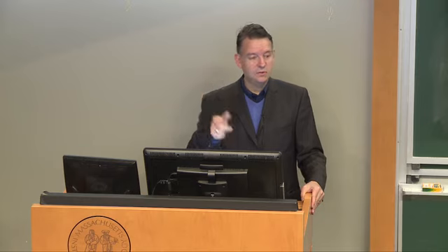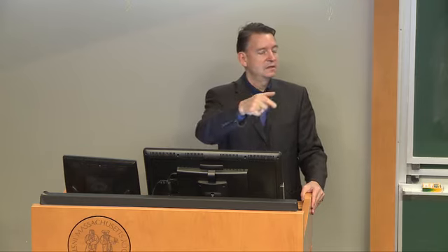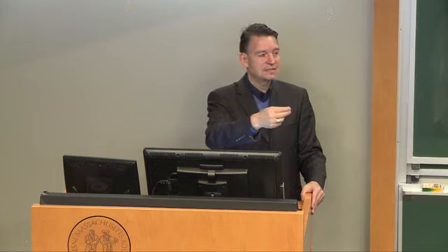But for example, we just talked about testing. If you have a very limited budget, what is the first thing people typically cut out? What's the first thing to go? Testing. Testing is very important. Sam asked me during the break, what's your typical budget for testing and V&V activities? And in many programs, it's very substantial. 40% of the budget, maybe 30, 40% of the budget, easily. And so you start cutting out tests. Well, what you do is you introduce technical risk. And if you have failures because you didn't test, that could cause you additional rework and more cost.